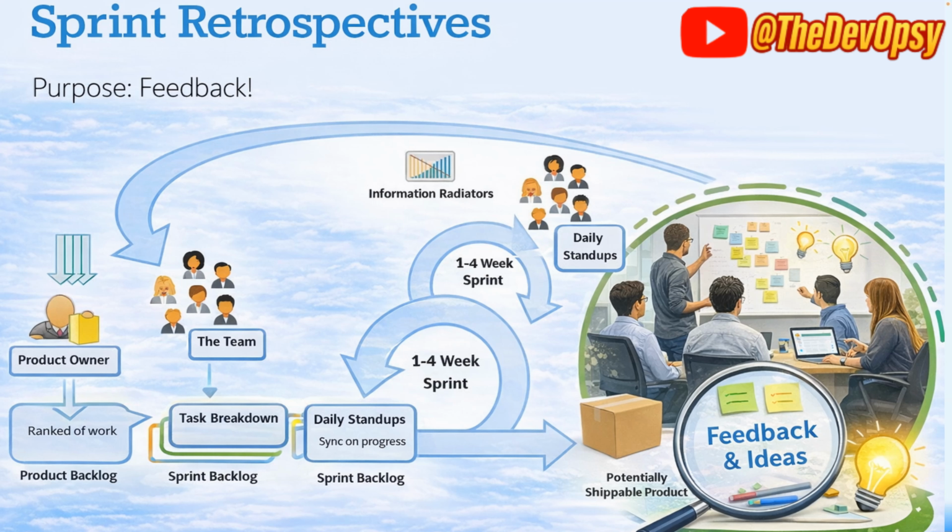We had our product, we did a sprint review, we got feedback, and we are doing the sprint retrospective. This retrospective is within the team. The purpose of the retrospective is to have the team members provide feedback to the team, so a feedback from the team to the team. Once the feedback is created, it will be put in the product backlog if needed, or the team will take care of it in terms of process, culture, tools, etc.